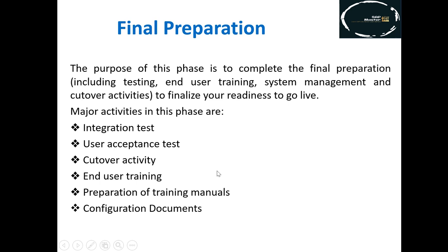The next one is final preparation. This is our fourth phase of SAP methodology. In this phase, we are majorly going to do integration testing. As I already told you, what is integration testing. UAT, just now I told you what UAT testing is. Now the cutover activities, what is it? What is cutover activity? The uploading of transaction data and master data from the legacy system to the SAP system is called cutover activities.